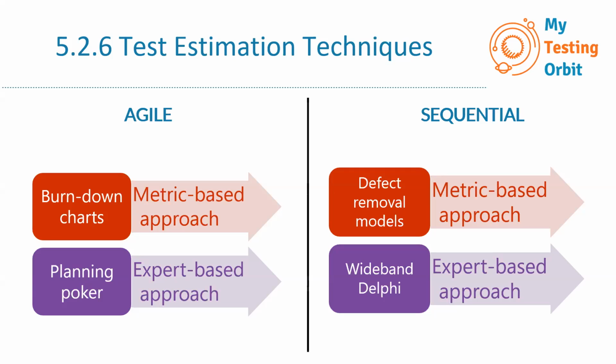So when we start a sprint, then we allocate some time, the velocity, to that sprint, and then every day we track and see if we are on track. This is basically the aim, to see if the project is on track and will be able to deliver the contents at the end of the sprint. It also helps to determine the amount of work the team can do in the next iteration.